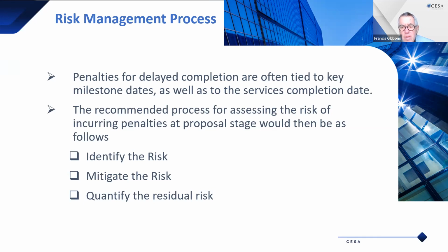Often there's a significant period between the date of submission of a proposal and the award date. And this can lead to team members no longer being available for the project, or having a lot less time available to do the project. And so that would obviously lead to perhaps either putting other people onto the project or delays taking longer than you expected.